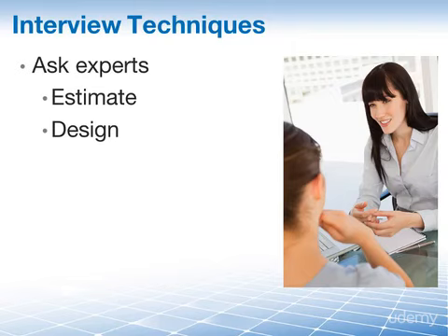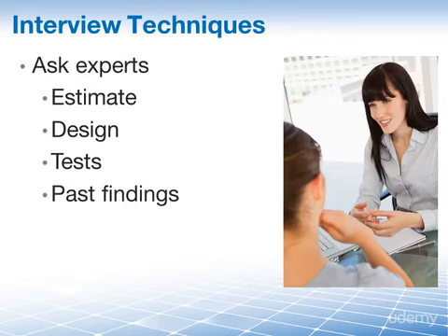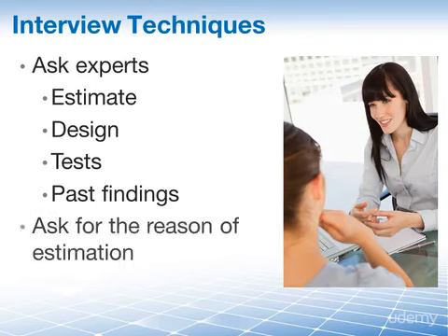You can also ask them if there are any tests or industry data to back up the likelihood or impact of the realized risks, as well as findings from past projects or similar endeavors. Experts will know about those. To retain its factual accuracy, asking for the reason for the estimate or analysis is crucial. The data backing up an expert's claim or verifying its connection to the project risk at hand is important to collect.